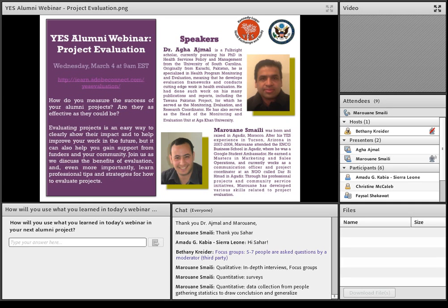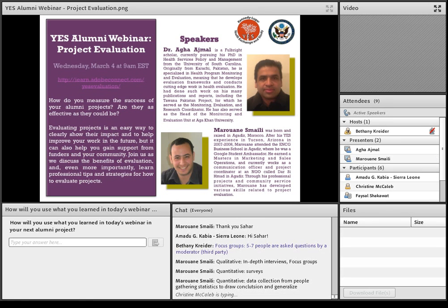Did you respect the budget? Did you go beyond the budget? Is there a deficit? Is there a surplus? Did you respect the deadlines? If not, why not? Do you need more people to pitch in and help? It's all of that. So the evaluation is not only about the quantitative part.